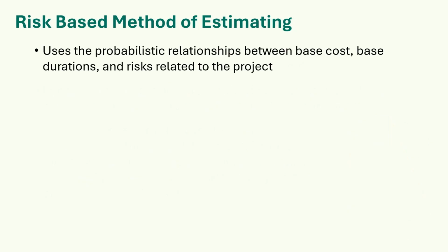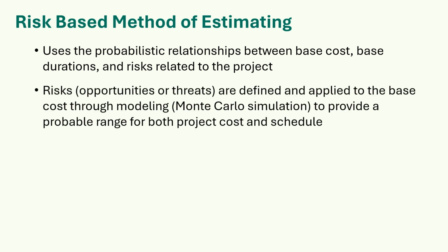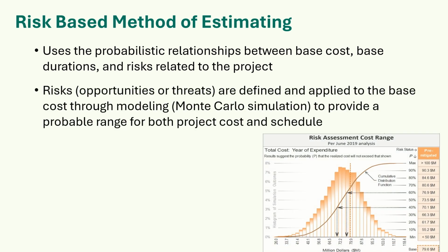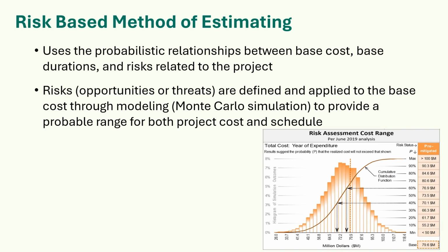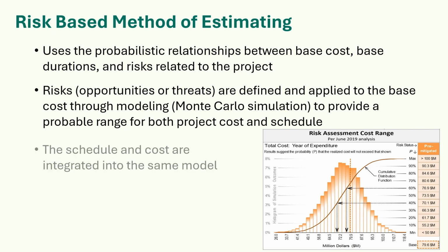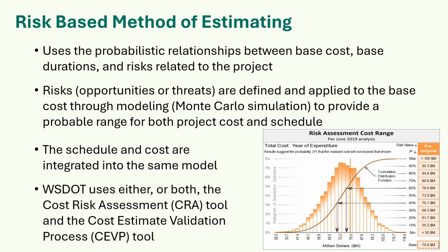Risk-based method of estimating. Uses the probabilistic relationships between base cost, base durations, and risks related to the project. Risks, including both opportunities and threats, are defined and applied to the base cost through Monte Carlo simulation modeling to provide a probable range for both the project cost and the schedule. The schedule and cost are integrated into the same model. WSDOT uses either or both the Cost Risk Assessment (CRA) tool and the Cost Estimate Validation Process (CEVP) tool. The latter is for larger value, more complex projects.